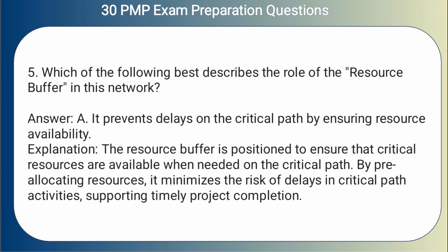Explanation: the resource buffer is positioned to ensure that critical resources are available when needed on the critical path. By pre-allocating resources, it minimizes the risk of delays in critical path activities, supporting timely project completion.